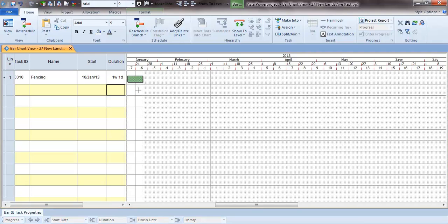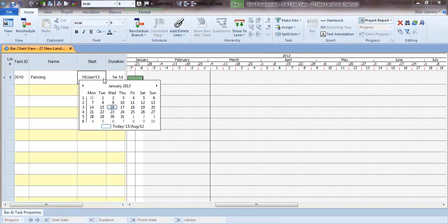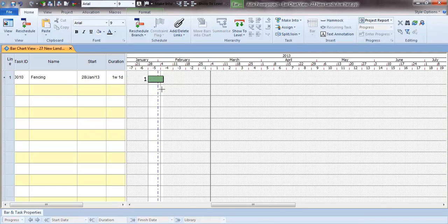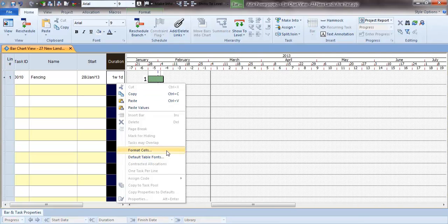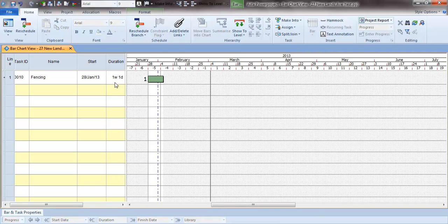which it places at the date, which you can obviously edit, and it also converts the duration that I typed in into one where I can affect from the format. So I've said that I want to display it in weeks and days. So I could say this is going to take me 72H for hours, and it will be displayed as 1 week and 4 days, or I can say 2 weeks and 3 days. And so the flexibility of time units is very good.